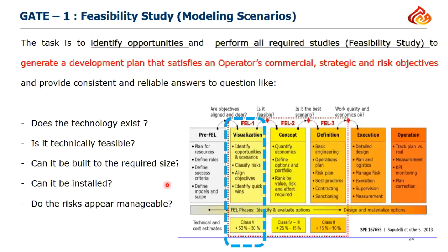Okay, and after that, I will go to the first phase, the feasibility study. And what kind of evaluation shall I conduct in this phase? I shall check if the options I have proposed in the workshop are feasible or not. Only this is our target here: is it technically feasible or not.